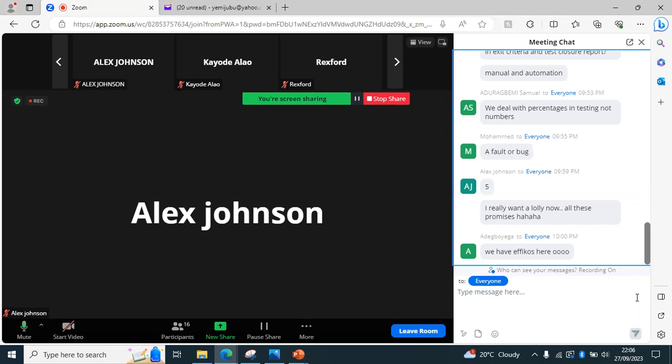When you look at the story, the first thing I want you to think of is: what is this story about? If you're taking a login scenario, there are many possibilities. You are doing both positive and negative scenarios, so you have to take your time to test it. There are certain validations to be done there. A 3 might not be enough. You could put a 5.